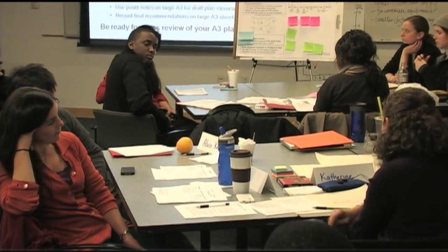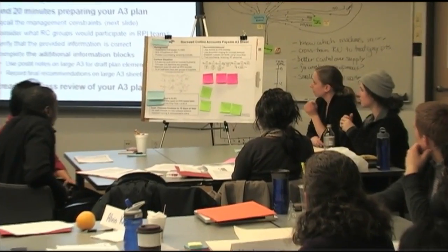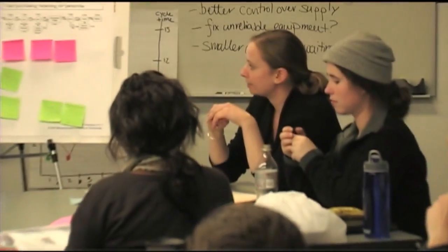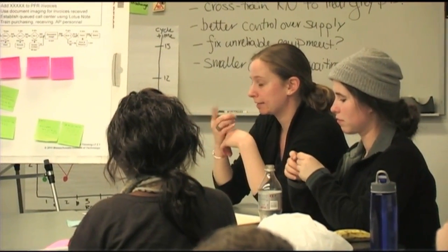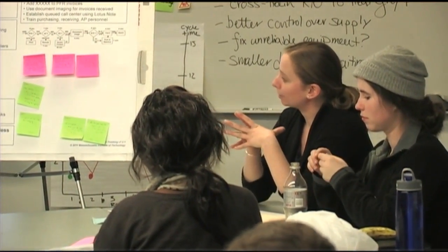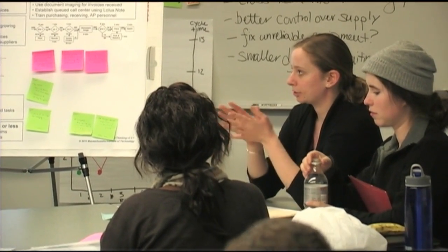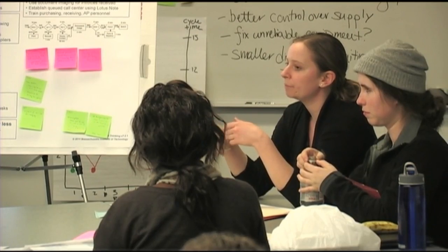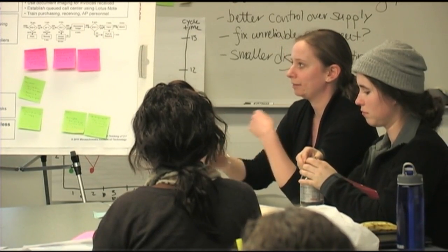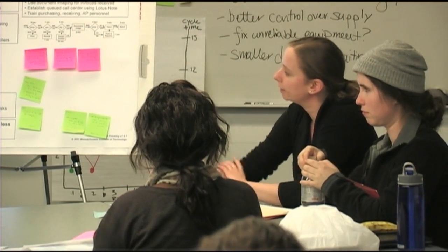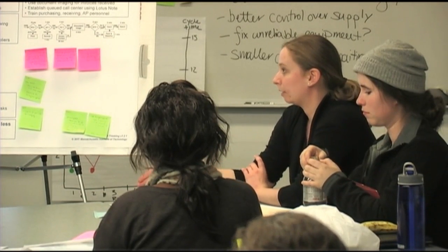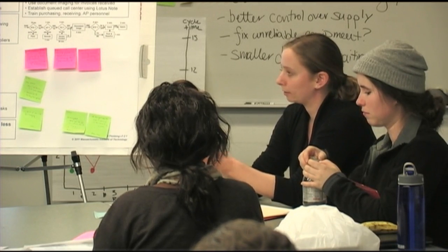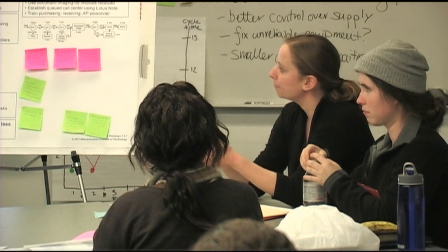Okay. Last table. We talked a lot about the process of putting the tags onto the addresses and used a similar idea to that table of the pilot. We wanted to start with one person from purchasing, training them and adding the tags, and pick a local company or a couple of local companies to add it to, just so that we could be sure that we actually got the invoices before the end of our 30-day period. And then also training all of the mailroom on that first day about what to expect, because they'd start seeing faxes coming, and we couldn't guarantee that one versus another person would see them.